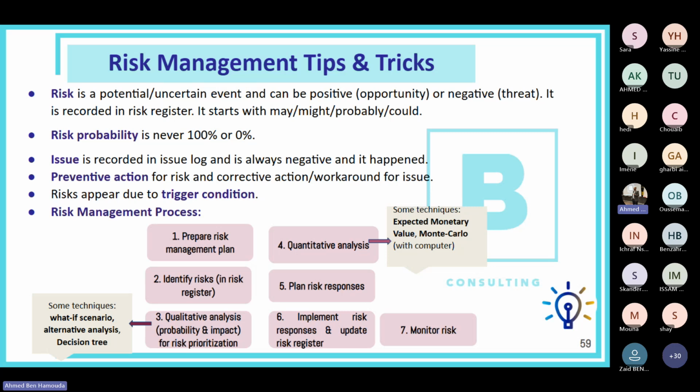However, an issue is recorded in the issue log. An issue is always negative. It's always a problem, okay? And it is something that has already happened. So please remember this. We usually take preventive action for risks, and we take corrective actions or workarounds for issues.